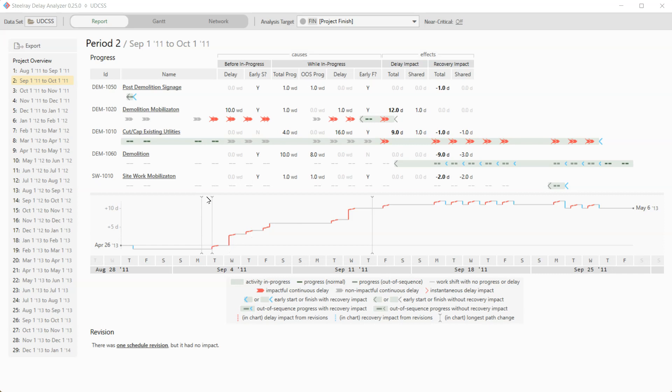Now, what do these lines mean here? We see three of them. What they mean is that on this day, the longest path changed and then it changed again on the next day. And then it didn't change for about a week and a half and it changed a third time. So that's what these lines are telling you is when the longest path changed.